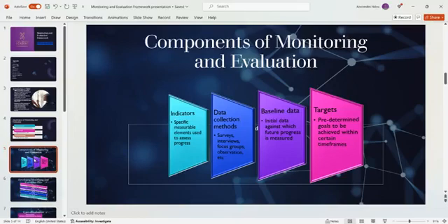We must check the baseline. What is the baseline saying? The baseline will be saying that for the past 5 years, the matric result has been hovering between 70 to 80% or 82% or so. So based on that, you begin to ask questions. If indeed for the past 5 years they've been hovering around 70 to 82% or so, why can I have an objective of targeting 90%? Because it's a stretch from 82%, for instance, to 90%.